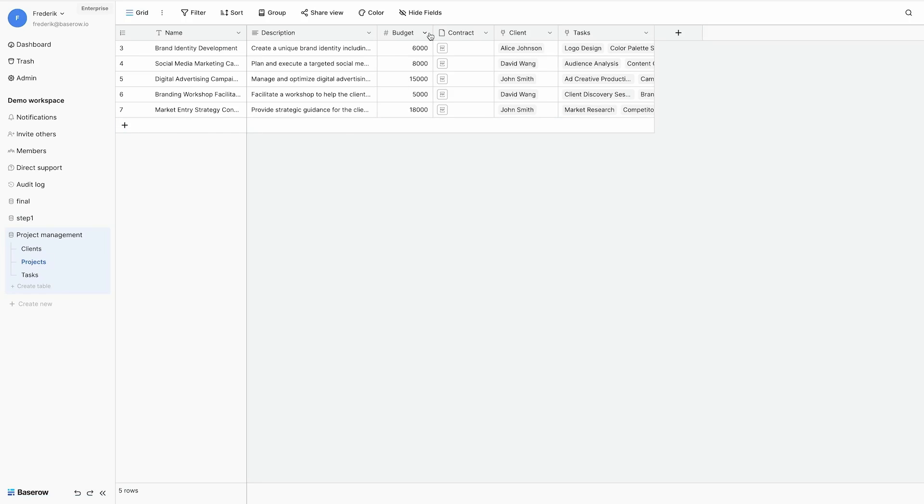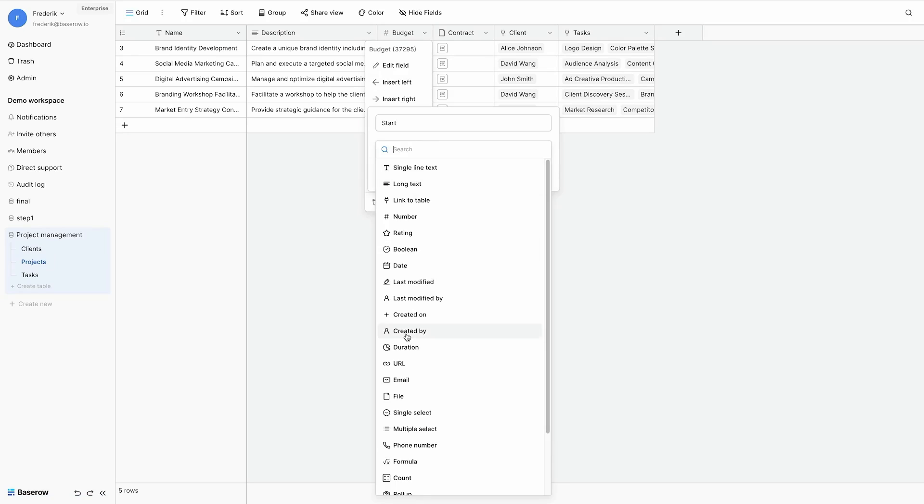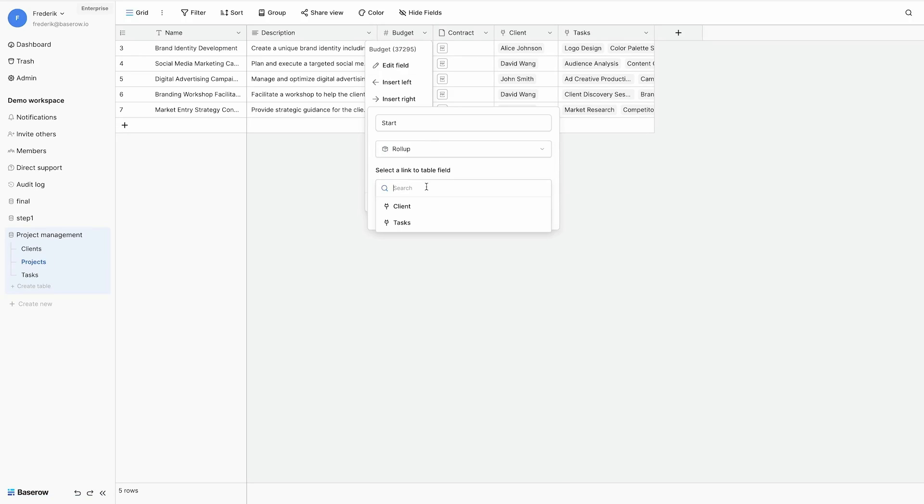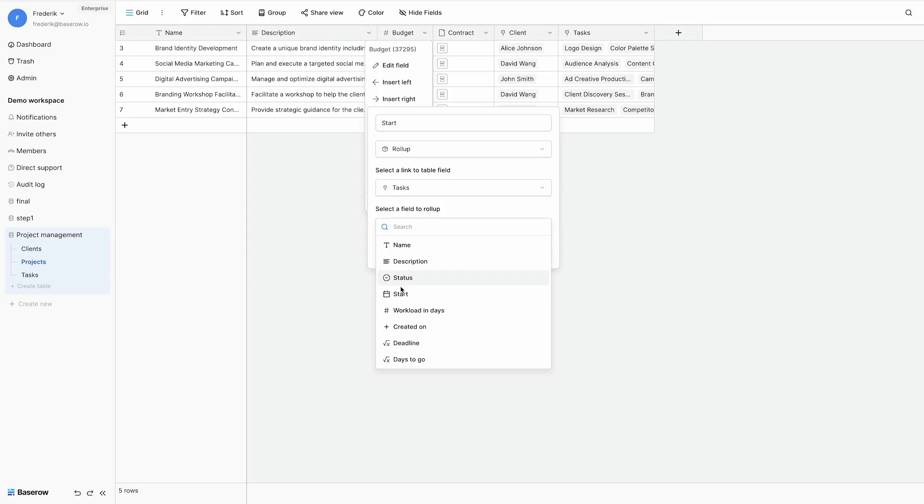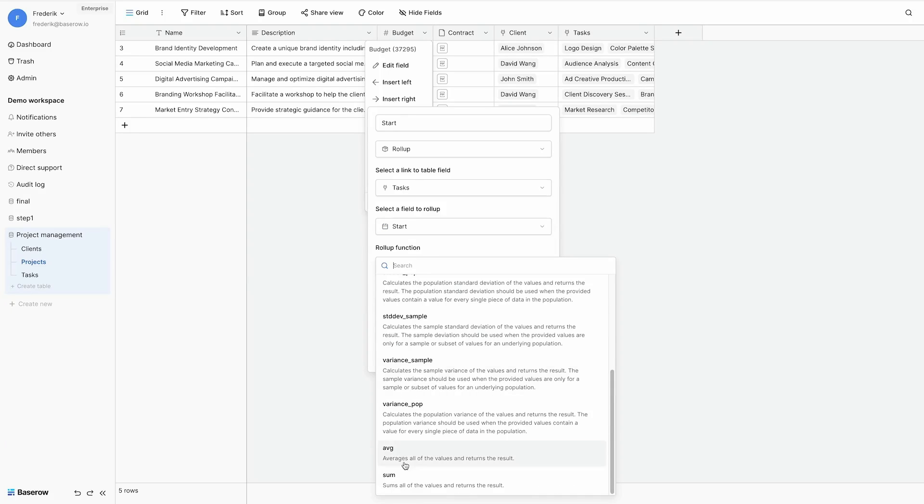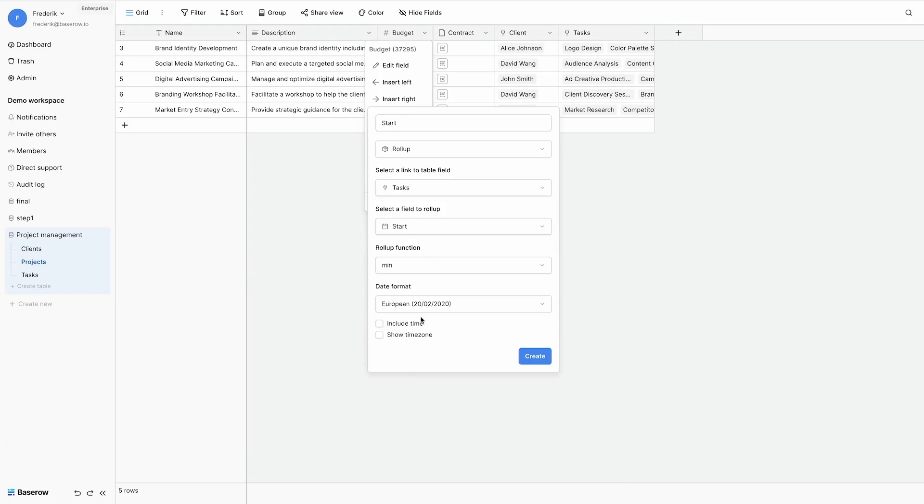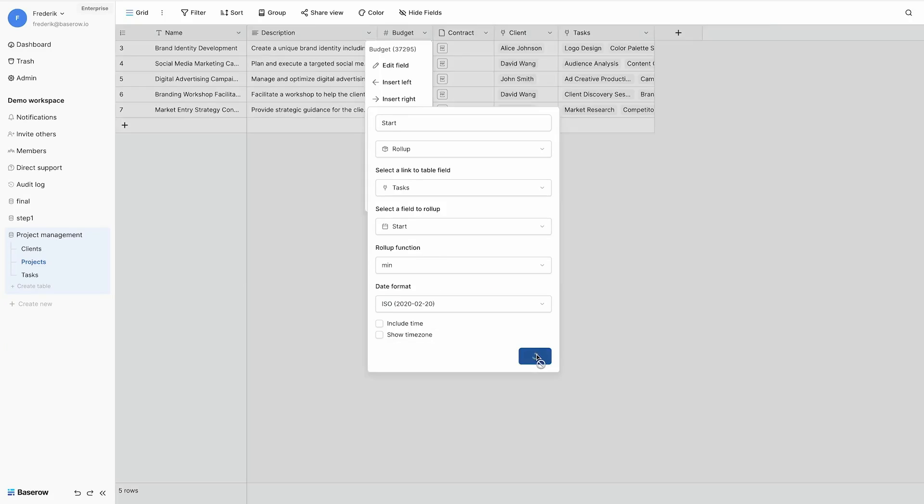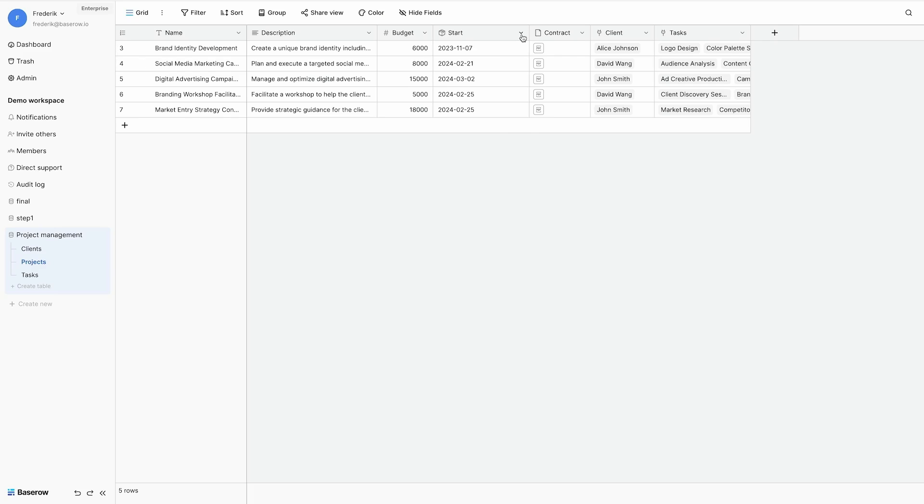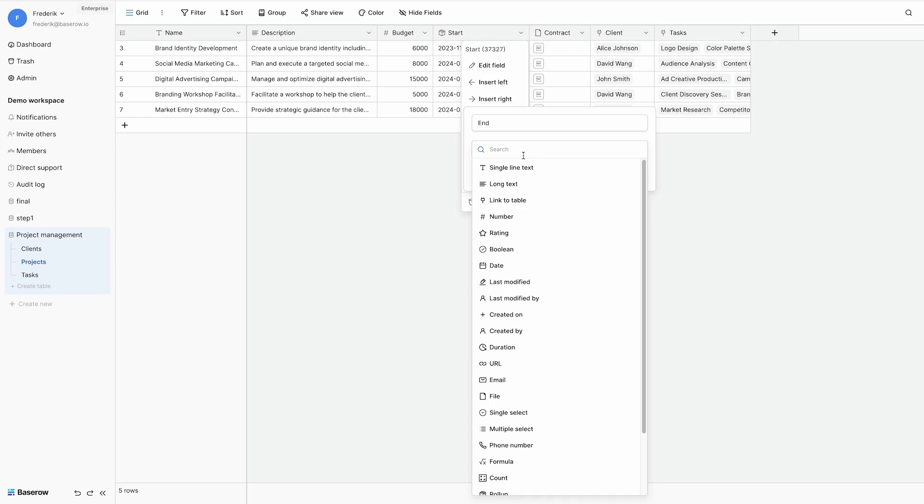Let's go to the projects table and add some additional fields here. For example I want to calculate the start date of my project. And I do this with a rollup field to my task table, where I take my start date. And I want to have the first start date. So the minimum start date of the task of my project.